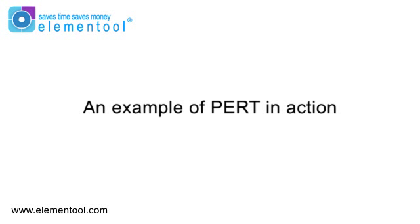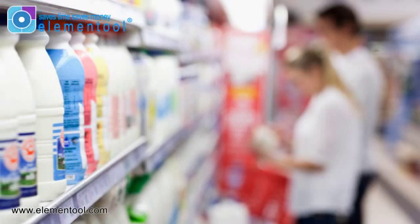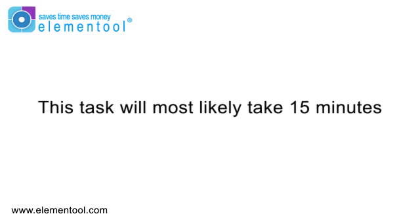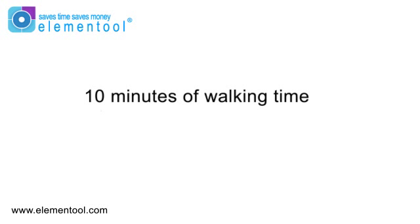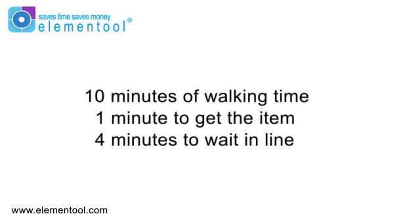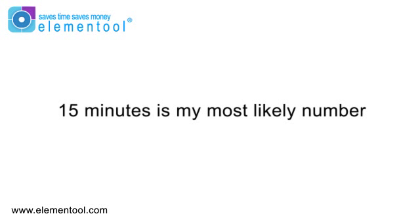Now let me give you an example of PERT in action. Let's say I want to walk down to the corner market to buy a quart of milk. From my experience, I think this task will most likely take about 15 minutes: it's 10 minutes of walking time, 1 minute to get the item, and 4 minutes to wait in line. So 15 is my most likely number.